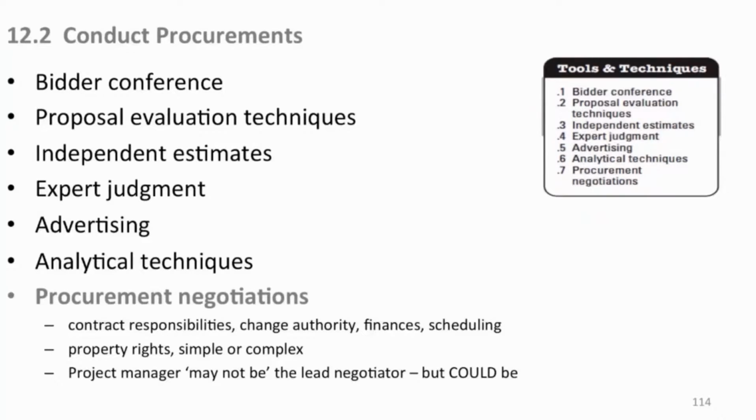Contract responsibilities between people: what if whoever signs the order goes away? You may have authority figures in their production, a really great production manager who'll get a good job done for them, and for you. If he leaves, what happens? All these things you can ask, depending on the criticality and complexity of the item they're trying to build for you. Scheduling: you're going to give us this in 6 months. That's within our schedule, but it would be really beneficial if we could get it early, because then we can move some tasks. Can you do that? This is all very appropriate, as long as you're fair.